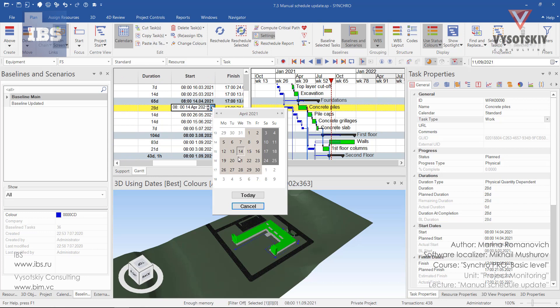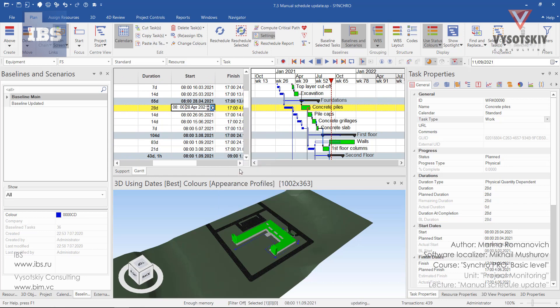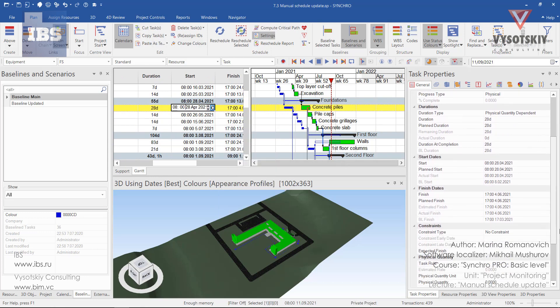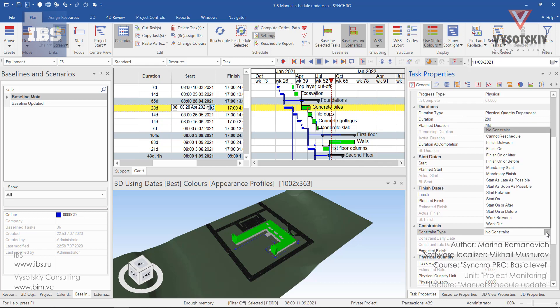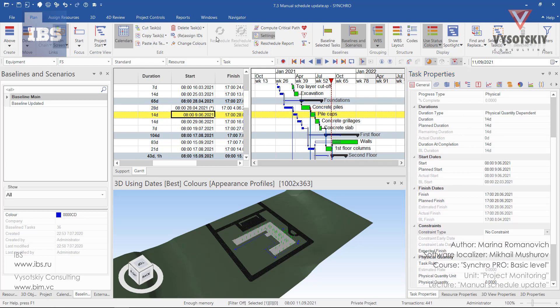So, let's shift it two weeks later and also change the constraint type to cannot reschedule. In our reschedule, we will have an asterisk appeared, that we have a constraint type applied on this task.